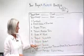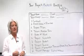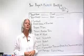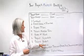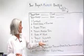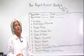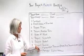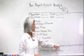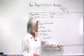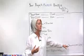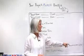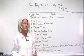Number seven is identifying the project budget, so you know how much money you have to spend on what specific items. Number eight is project reviews — since you have your schedule, identifying when the project reviews will be, including the milestones. Number nine is a big part: the project management processes. Documenting how you're going to manage change, risk, the procurement of different items on your project, administration, and any quality assurance or quality control.